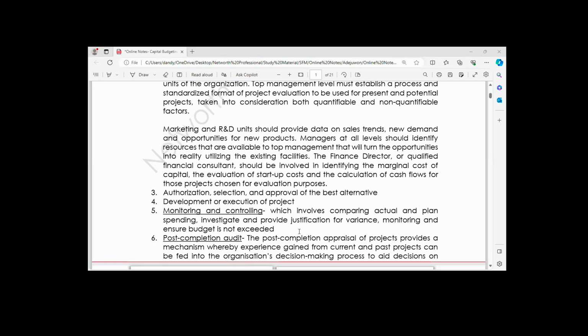At the end of the day, if you want to spend above your budget, it may well be that there's a change in scope. Possibly there's something that was not within the contract before. Now you have introduced it, you want to do it. As a result, that will involve a cost. It will involve money. So there's a tendency for you to go above your budget.